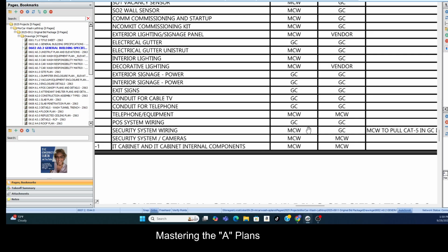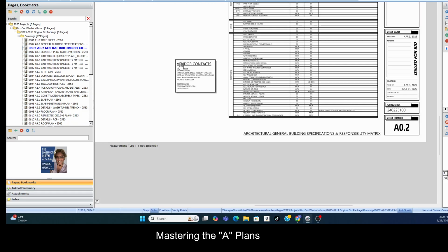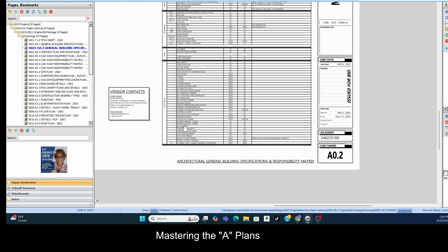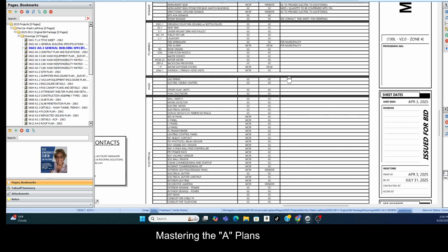They really don't. But one thing I recommend is that when they are supplying it, contractor, you add a markup for the handling of it. Because you still got to receive it, unpack it, and throw away the trash. Normally that's included when you are the provider. When you buy it, that's all included in your price because you mark it up. You have no markup ability when you don't buy it. So I say add 15% to something for your handling of owner provided material, no matter what it is.